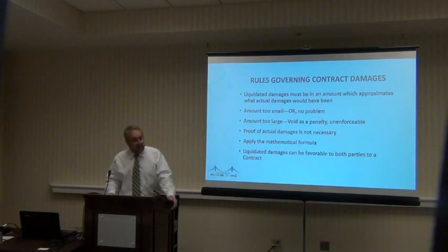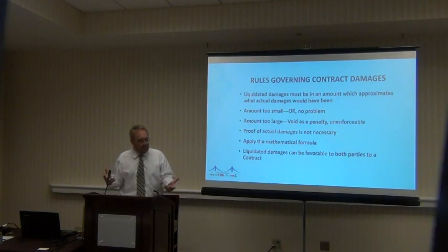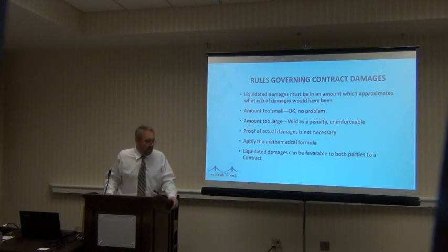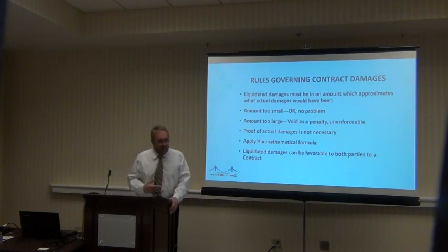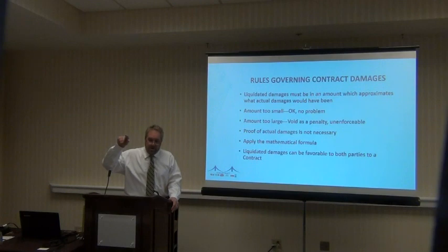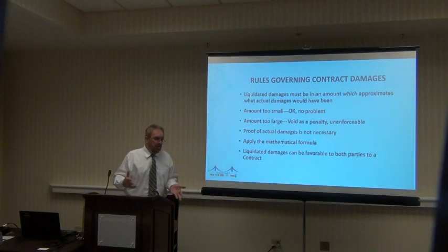Does who drafted the contract play in? Like you're signing a contract drafted by the owner versus the sub is signing a contract that you drafted? In certain instances, that can be a consideration. There are a number of contract provisions where you look at both parties' perspectives pretty evenly, and liquidated damages is probably one of those. So whether I drafted it and they agreed to it, or they drafted it and my guys agreed to it, we all agreed to it. So the rule still remains. It has to be a reasonable approximation of what the actual damages were.